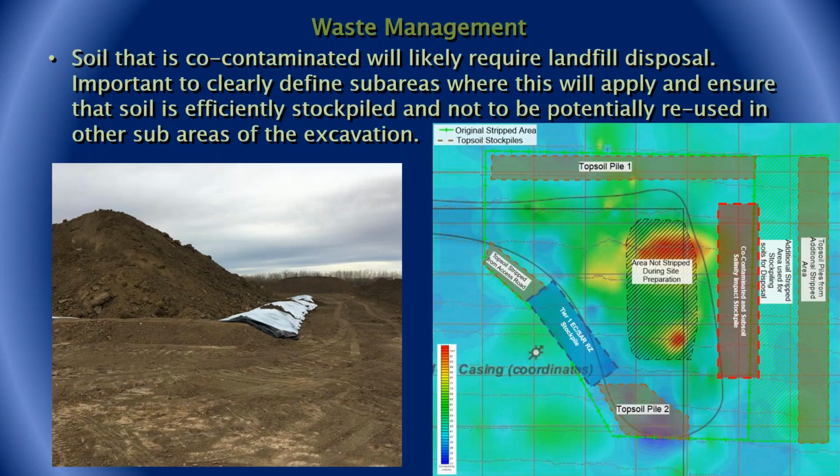Soil that is co-contaminated will likely require landfill disposal. It is important to clearly define subareas where this will apply to ensure that soil is efficiently stockpiled, not to be potentially reused in other subareas of the excavation. This is important when defining your stockpile placement and truck routing to minimize movement of stockpiles, and allow room for trucks and equipment to safely operate at the site.